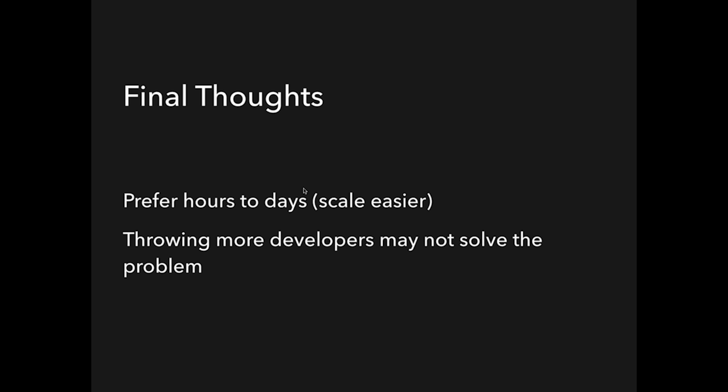Throwing more people or developers at a problem is not going to solve it. I always use the adage, it takes 9 months to make a baby. 9 women can't do it in 1 month. You have to really focus down on what has to be done, what can be done in a certain amount of time, and it goes back to focusing on the positions. Look at what's best for the company and getting things done in a timely manner.